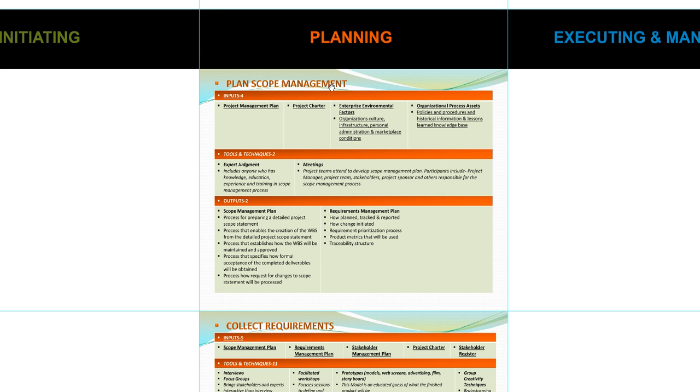Okay. In the scope, the client wanted 3 bathrooms. So I have to make sure that I'm giving him 3 bathrooms and not more or not less. So when it comes to construction or engineering or architecture or any IT project where the client is giving me a scope that this is what I need to be done, I have to make sure that I am just giving those many things to the client. I don't give anything more because that is going to cause scope creep, and I'm not going to give anything less because then my project won't get approved.